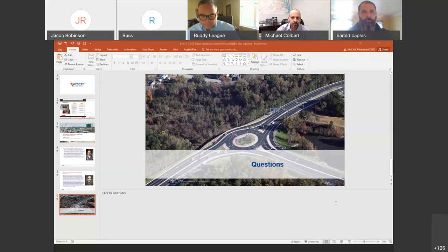Yeah, unfortunately, we're seeing a disturbing trend in our contracting. I mean, we work for VDOT. We can pretty much set our watch by when the check is coming. Depending on the locality, we are seeing extended payment terms out there. You can run anywhere from 45 to 60 days. And to Mike's point, we are for-profit organizations, and we typically have to finance the first half to three quarters of our year before we really get cash positive. So those delays in payment set that back even further.